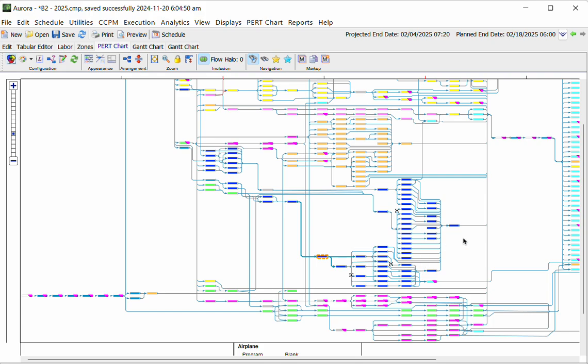The goal here is to make sure that we are continuing to have as good a schedule as possible without disrupting things unnecessarily. The degree to which it makes sense to keep your schedule dynamic depends a little bit on time horizon and whether things are in work already, and how nimble your particular factory area is. When you're in the planning stage and no work has started, you want everything to be as fluid as possible, but if you're in execution, you may want it to be a little less fluid, actually.